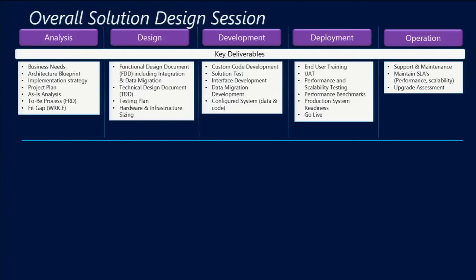I also like to see at this particular point the fit gap that we talked about, a clear analysis of the fit gap, and also a baseline project plan showing me the details from start to end. So that's in the analysis phase. Remember to introduce product. In the design is where we'll start to get more specific around the functional documents as well as the technical documents.